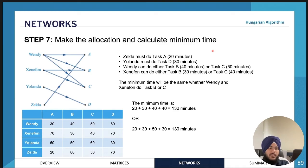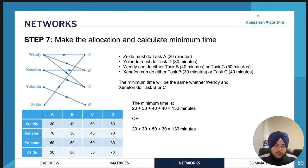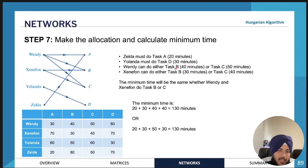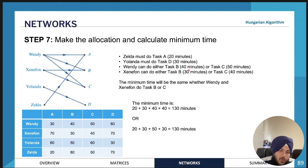Yolanda can do task D in the minimum amount of time, so she is allocated to task D — 30 minutes. Wendy and Xenophon can each do task B or task C, so it doesn't really matter which way you allocate them since either way you get the same total. Adding all times together from the original table, the minimum total time to complete the project is 130 minutes. That's how you use the Hungarian algorithm to find the optimal allocation.